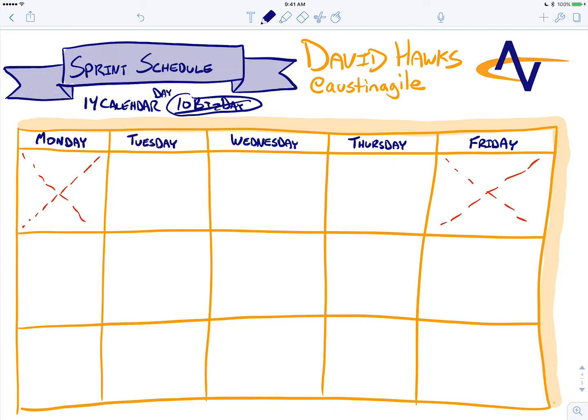So let's say we started our sprint on Wednesday morning, which means we are starting with the first Scrum event, which is sprint planning. So we would start Wednesday morning with sprint planning for a 2-week sprint. That time box is up to about a half a day. So we would spend up to about a half a day. We would plan that time box, and if we finish in 2 hours and 23 minutes, great. Which means that at the end, the next Wednesday, two Wednesdays later, we would probably have another sprint planning. Let's kind of work our way towards that.